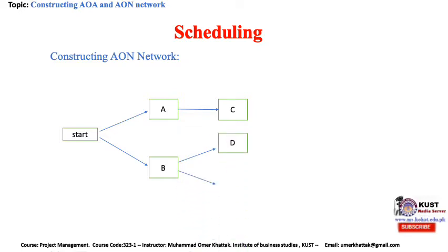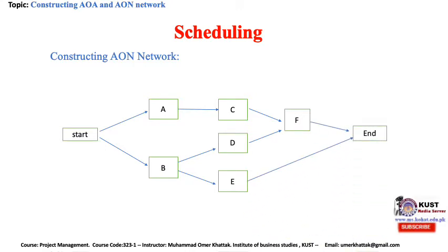B, and activity E follows B. Now, activity F follows both C and D. The action plan does not indicate any further activity is required to complete the task. So we have reached the end of this particular plan. So we draw arrows from activity E and F to the node called end. Many of the project management software packages will generate these networks on request.